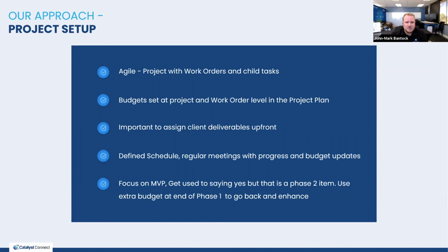And in our experience, we know that there's usually 4 hours of miscellaneous conditions that we need to build in here. So when we give our budgets, we'll give a low-end budget for that piece, and we'll carve out a certain number of flex hours of anticipated changes or enhancements that are going to come down the line. And that way it's budgeted for upfront. The client doesn't get a surprise when you have to take the 2 extra hours to build something custom to handle that unique one-off circumstance.